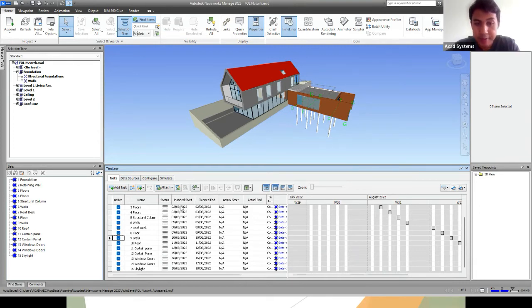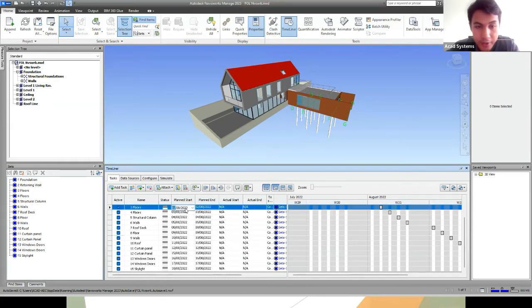But then it gives you the plan start and plan end by default. So you need to adjust those if you need, because right now it gives you for every set 1 day to complete the task. So it doesn't make sense. These are basically the task window, and to the left here we have the Gantt chart.